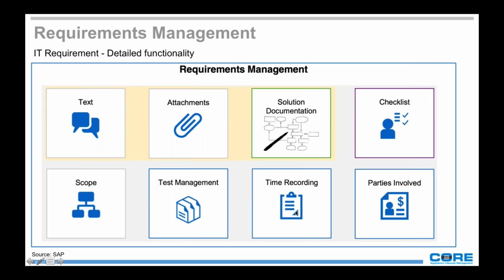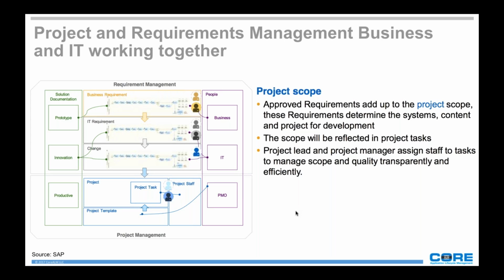And then some other pieces here that are also really cool for the IT PPM as far as collecting timing. How much effort did I put towards this requirement and the development? I want that number to be counted towards the amount of budget that I put in my project. I put like 500 hours for this project. So every time someone creates a requirement and goes all the way to deployment, I want to keep track of those hours, and I want to count those hours against the hours that I have defined in my project. That's a really, really powerful tool, integrating all the different elements.